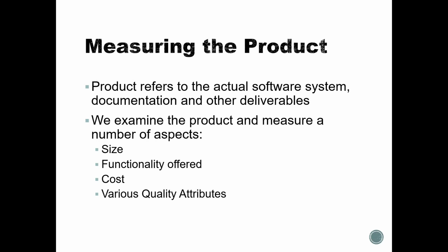If we want to understand how much money we would have to use to create, for example, one new attribute or ability for our software, we more or less have to decide or calculate how many changes we need to make, how much complexity that would add to our product, and then based on that use a cost estimate on how much working hours or time it will take to design, develop, and do the quality assurance work before putting that attribute out.